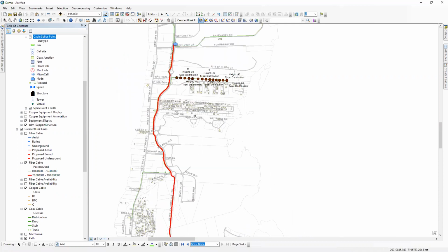So one simple way is to utilize Project Planner. So if I were again to ballpark it between planning, construction, labor, materials, let's just say all in, we spend about $75,000 per mile to overbuild fiber with a 144 cable. So what that works out to, if you do the math, is about $14.20 per foot.